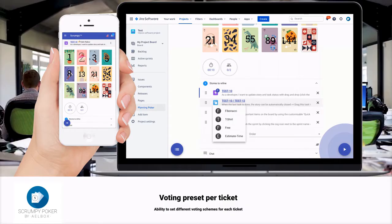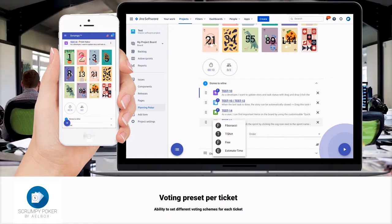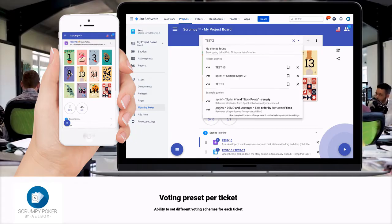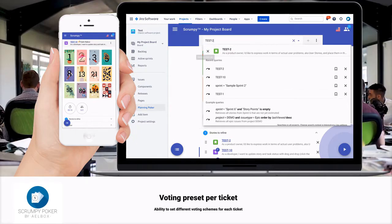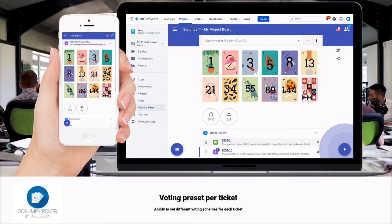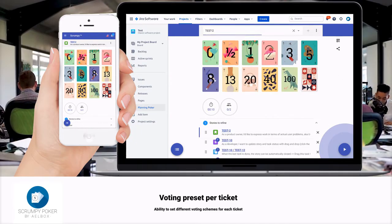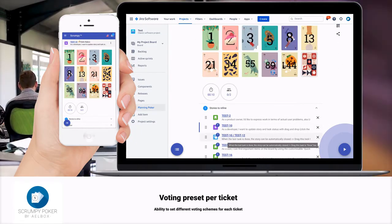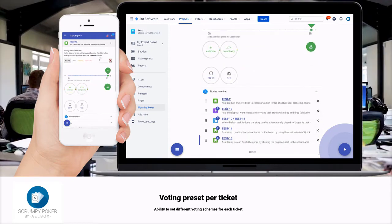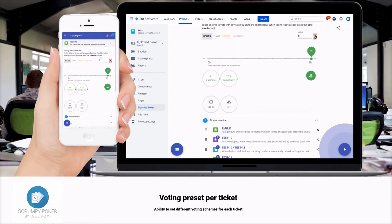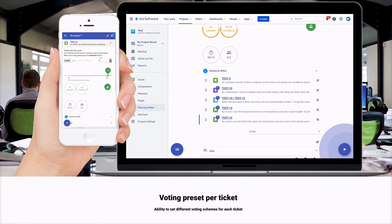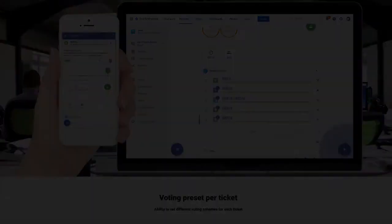Each ticket can have its own preset. This means a separate set of cards, different mapping of each card, different voting view and even different type of consensus estimate metric like time and story points. The voting layout and view changes with the story on focus. Everything is synchronized in real time among all participants.